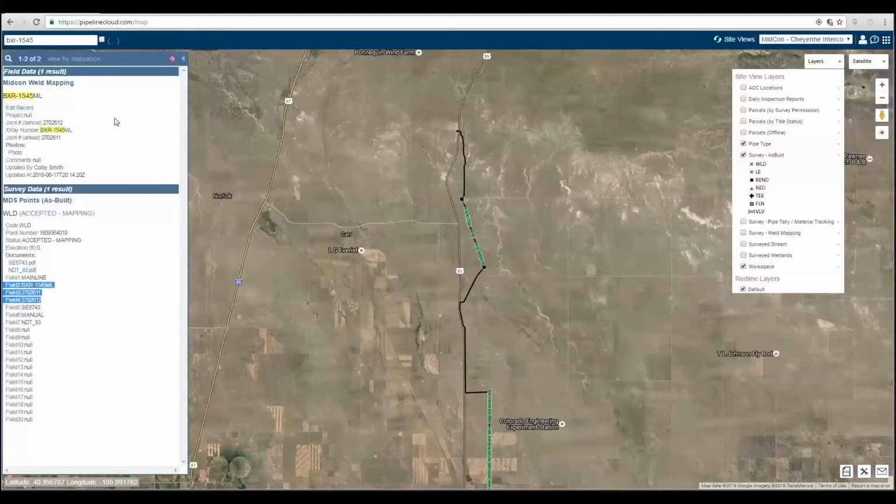Our survey teams will perform as-built survey and on a nightly basis upload the information into TRC's mapping data solution, also known as MDS. This is another example where our solution and technology differ from others in the industry. Through an automated and manual validation process, the MDS system and our survey techs will audit the spatial and attribute correctness of the data,